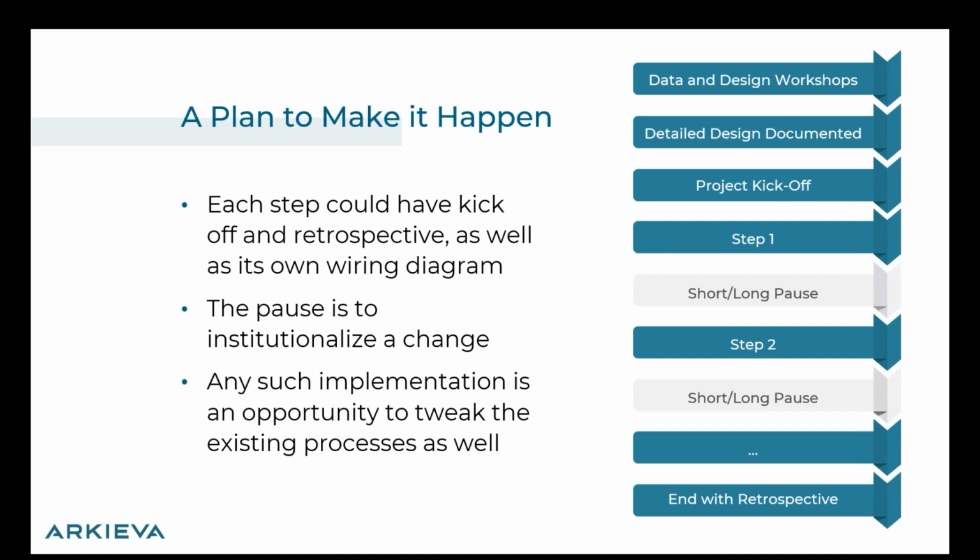Then the design workshop also needs to have a plan to make it happen. This is slightly different from just publishing the timeline. We are talking here about how we will take the users along, how we will take them from here to there, being the to-be state. So for this reason, each step or each module should have a kickoff meeting, which should be clearly outlined in the design document, as well as an ending retrospective meeting, and each step should have its own wiring diagram.